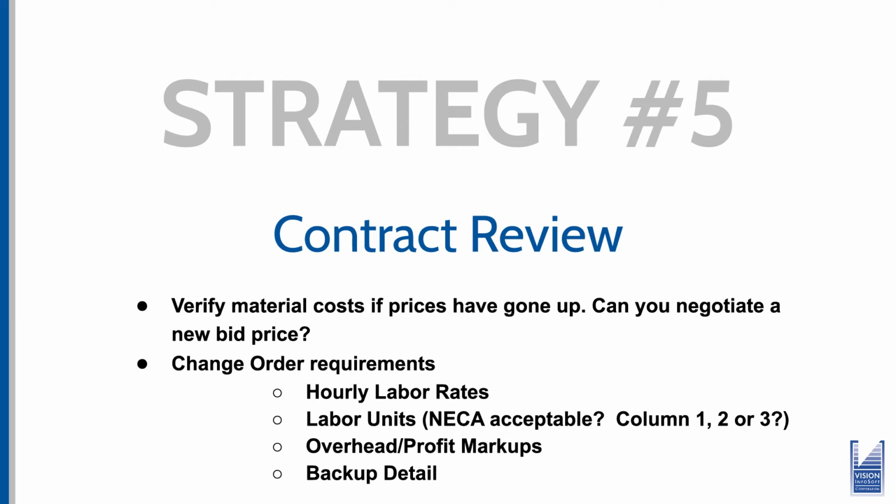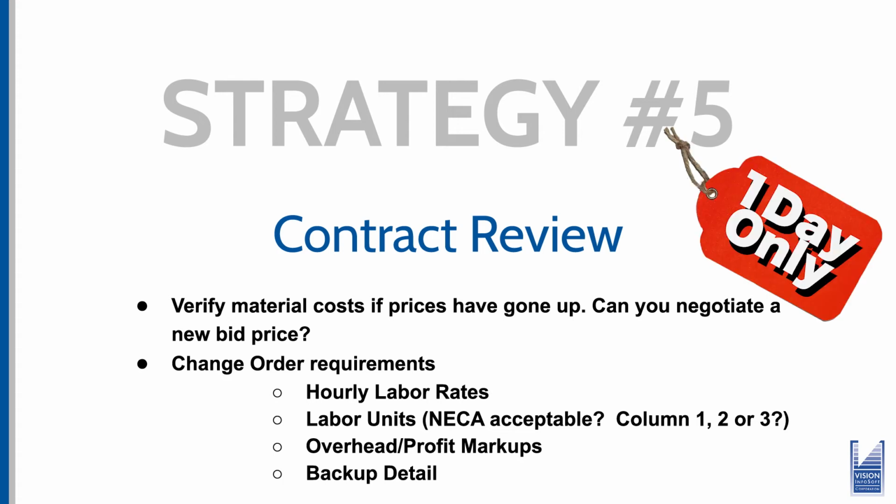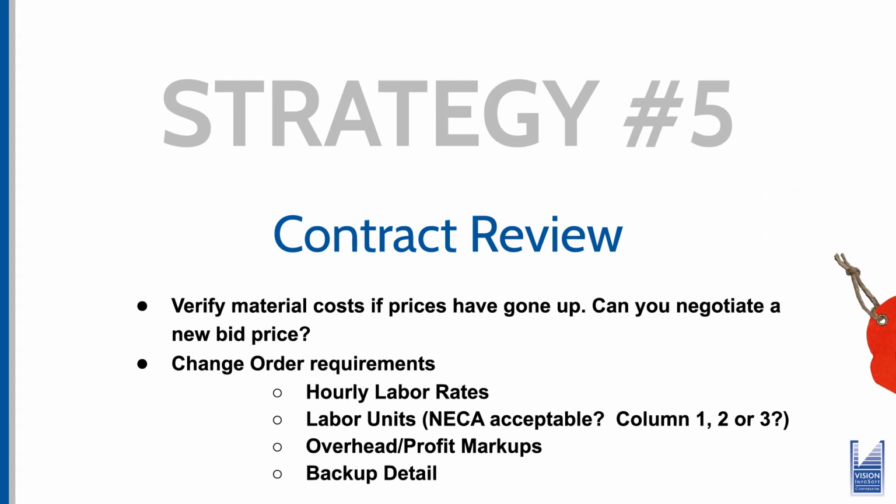What does it allow for? What period of time can you pass on price changes for? Sometimes it's just a verbal thing, and what's reasonable here. But when you're qualifying your bid, you should let them know the prices are good for a week or whatever it is. Some suppliers will just tell you that price is good today. That's it. If you buy the material today, that's the price. Tomorrow, we can't make any promises.